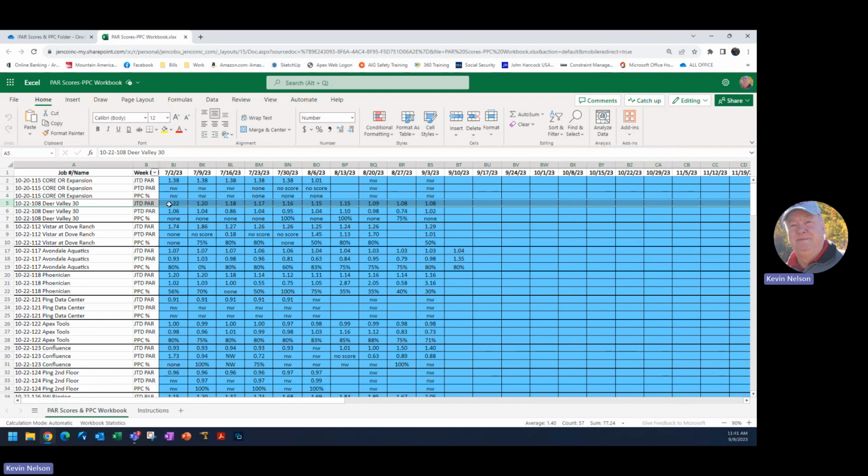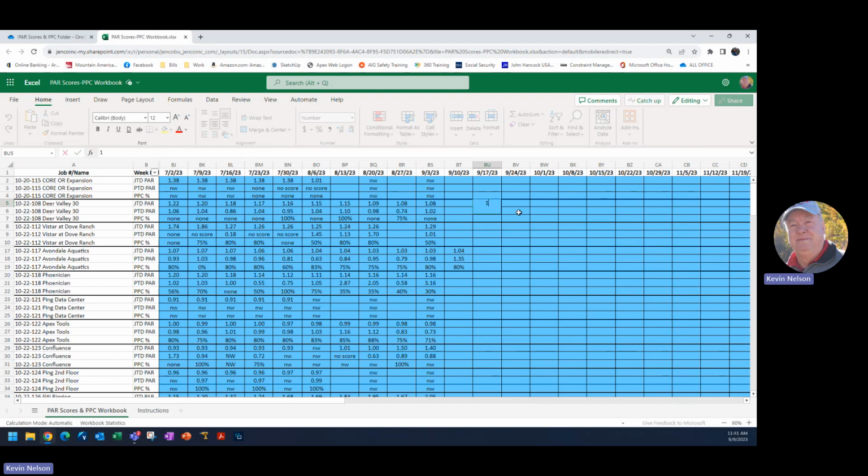My job to date PAR score for 9/17 is a 1.09. My period to date PAR score, that's this line, was a 1.13. And my PPC, plan percent complete, of my weekly work plan, which is in another video, we've determined that weekly work plan, we'll say it was 60% complete.